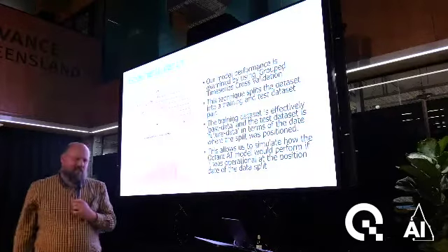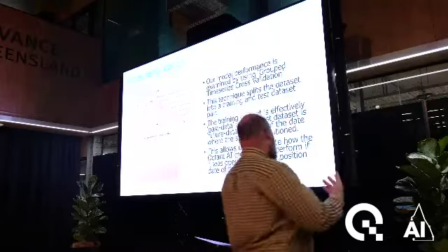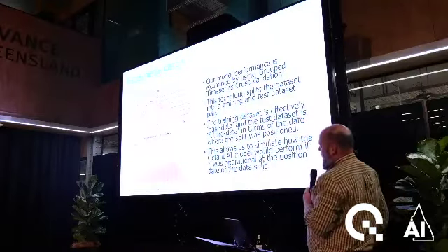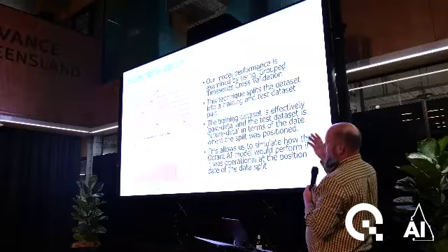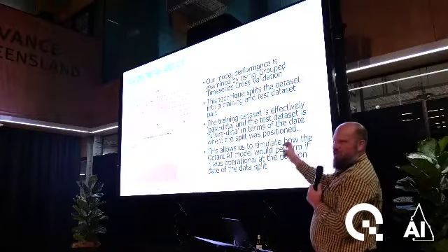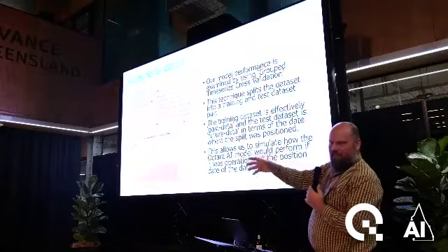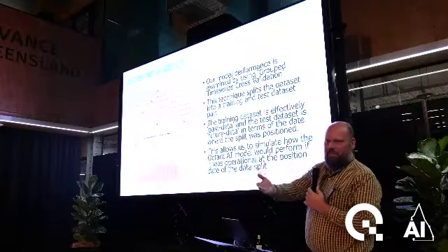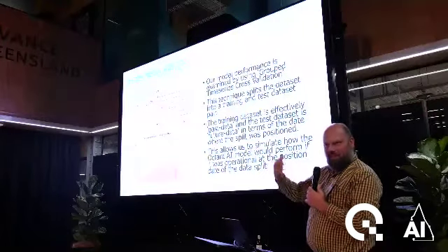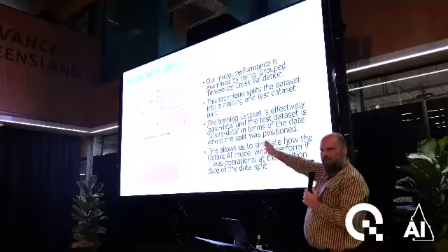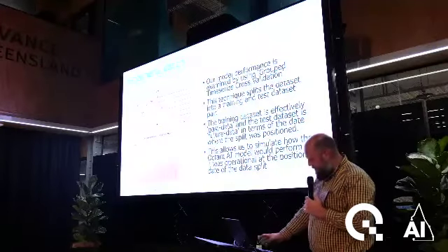But there are other customers where they don't have such good data sets, and you may have to do different cross-validation. So you may just leave a few projects out of your training set. You fit the model on there, but the issue is it's during the same historical period. You'd like to do it before, because that's what's going to happen in real life when it gets deployed.